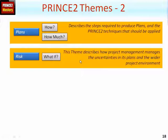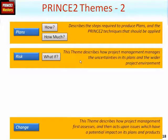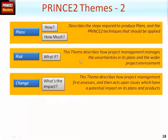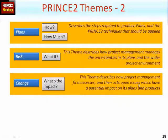The CHANGE theme describes how project management will initially assess change requests, carry out an impact analysis, and then seek the appropriate authority to decide whether or not the change should proceed. In PRINCE2, all changes are treated as a type of issue. Any change to what was originally agreed will have a potential impact on the project's plans and the products. So the CHANGE theme lays out a structured process to ensure that only those changes that are authorized are implemented.